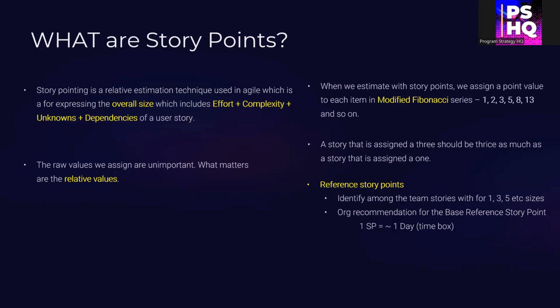And similarly, take one more story. Since you already have one reference story point, compare this new story with the previous one. Is it bigger than that? Is it smaller than that? Or are the effort, complexity, unknowns, and dependencies everything similar? If it is the same, give the same number. If it is bigger, give a bigger number. By doing that, you will have 2 reference story points, and the subsequent stories can be relatively estimated based on these initial 2 reference story points.